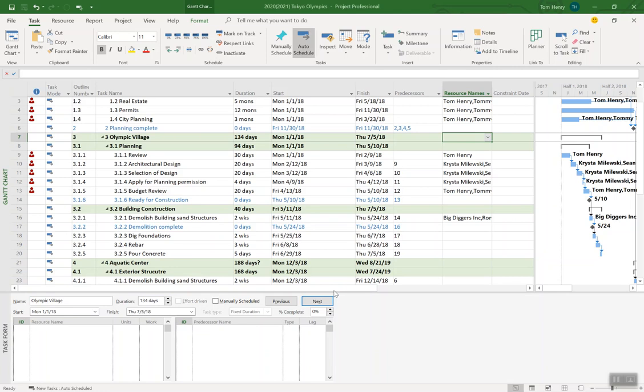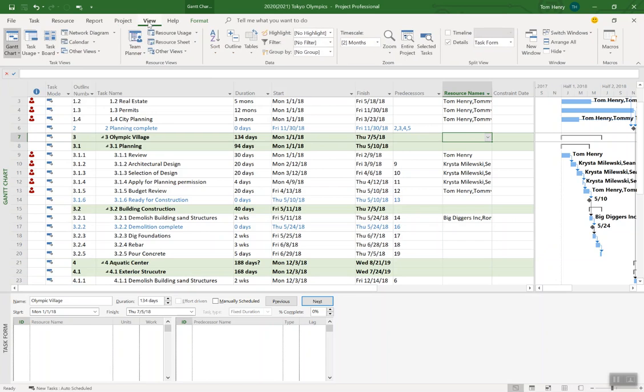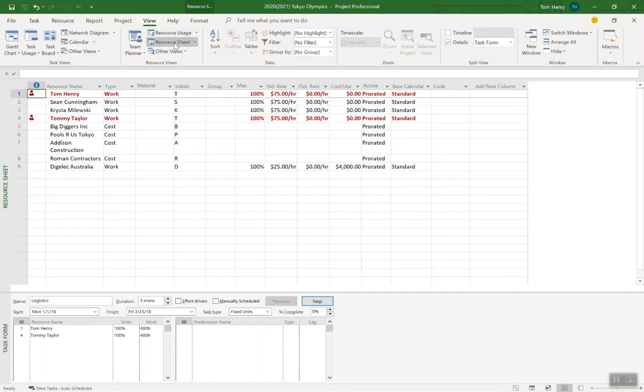Hey everyone, me again. I want to show you a few tips and tricks about how to assign resources in Microsoft Project. First thing you need to do is go to the view ribbon and into the resource sheet and build out your resource pool.